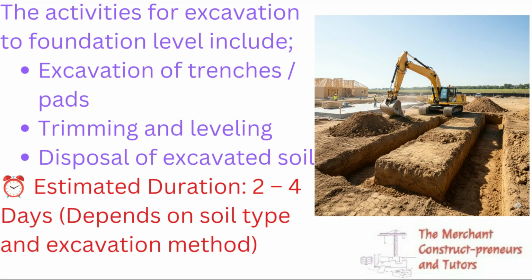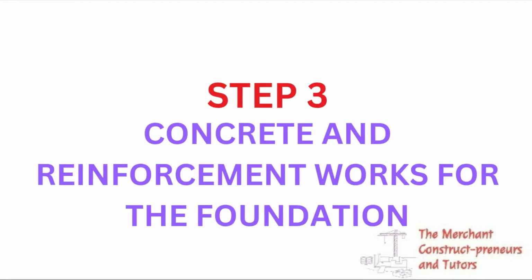So once you excavate based on what has been set out, you excavate, you trim, you dispose, right? So this is another step. So you cannot bring in the excavator to come and start doing the work before the site clearing and setting out. It doesn't work that way. So the third step is concrete and reinforcement works for foundation.